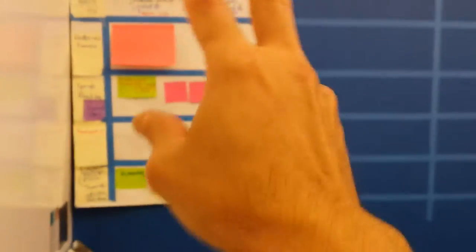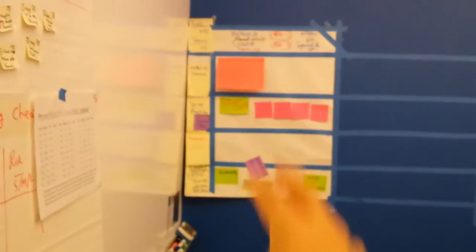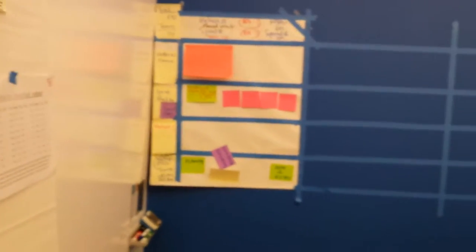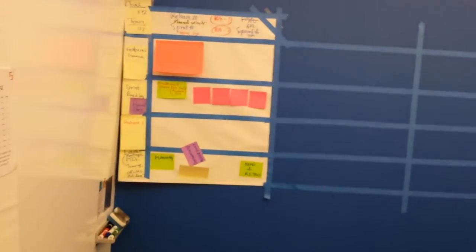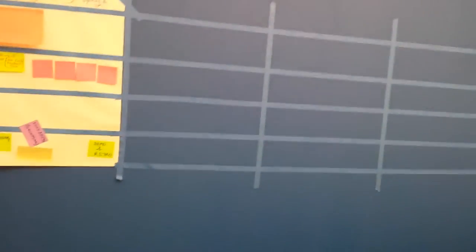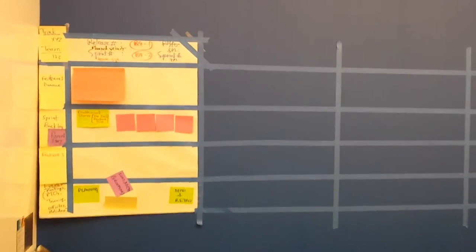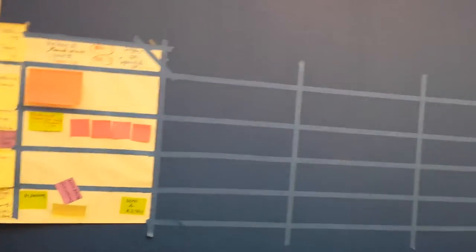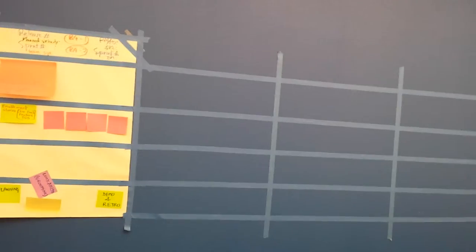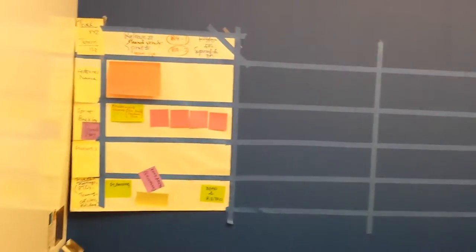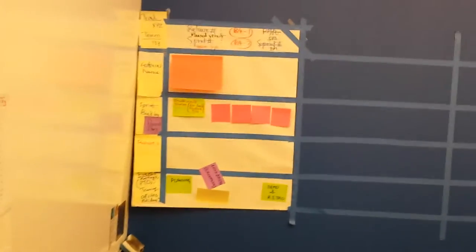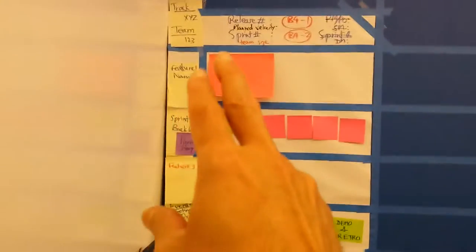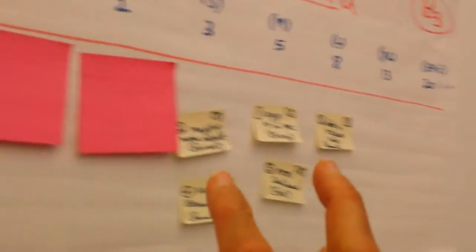We have this board—the accent wall that we see here is what we will use. We'll have the header sheets on the left side, three of them. Essentially, we're talking about two and a half days of planning of about eleven features, about one and a half to two hours per feature.